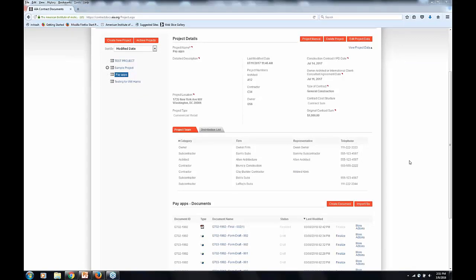Okay, this looks like the final question. If I'm canceling a change order, am I creating a new change order with a new number and decreasing the amount of contract sum instead of increasing? Well, if I'm understanding correctly, you could do it either way. If you're doing a deductive change order, then that is a new change order with an amount that is negative instead of positive. If you want to cancel a change order, I suppose you could create a new one and say, just forget that last one that we did. And then, so that's really up to you.